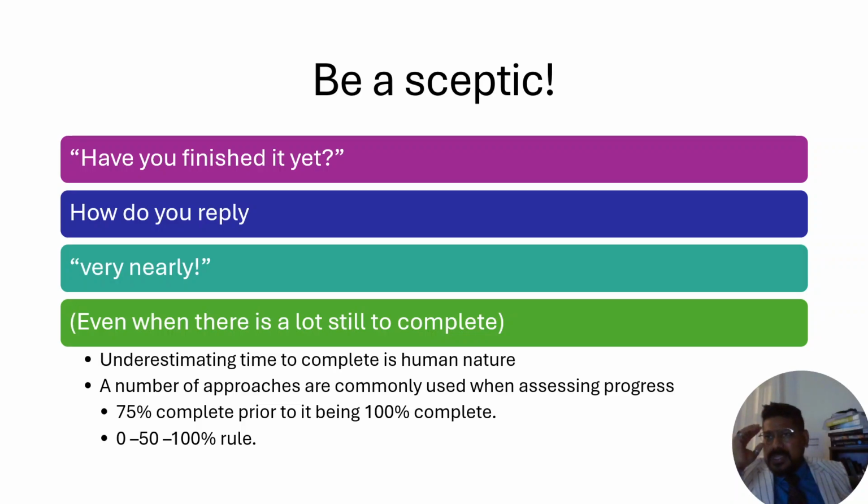Okay, be skeptic. Have you finished it yet? How do you reply? "Very nearly." No, it should not be "very nearly." It should be how much it is completed: 50%, 60%, 80%, and it should be documented well with evidence.